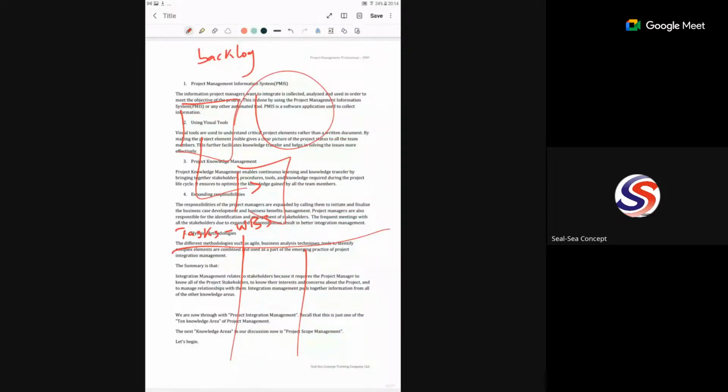We talk about which market you want to go to. How far is the market? Will you be going alone? How many hours will you use? Will you be needing refreshment before you come back home? In fact, all these things will be put into what place? That is what WBS will do. We break down a particular task into simple tasks. We now begin to assign the monetary implication, the cost, to each of them. We also assign a schedule to each of them.